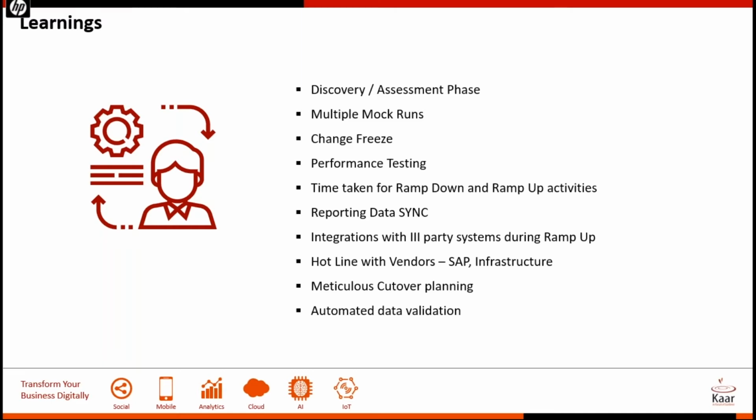One, it might not be applicable in the S4 landscape. And two, when you have to do it on the S4 landscape, you'll have to do it manually, and you're bringing a change to the whole process. So let's assume you allowed a couple of company codes or a couple of new configurations to go into production after you've done development. Now when you take that copy and do your QA, you're working on a completely different set of parameters. So the earlier you do the change freeze, the better off you are. And if you have done the discovery assessment phase, you're able to pull in some activities earlier, and you can keep your project timeline much smaller. So your change freeze does not have to be so long.